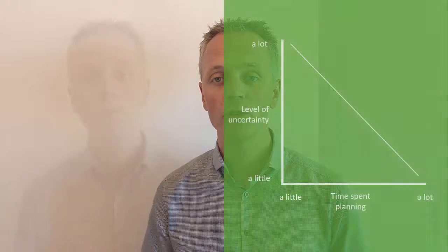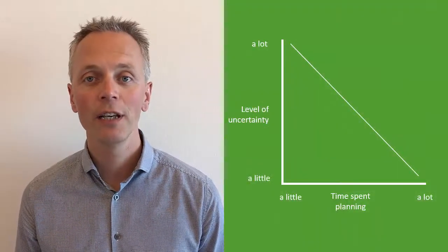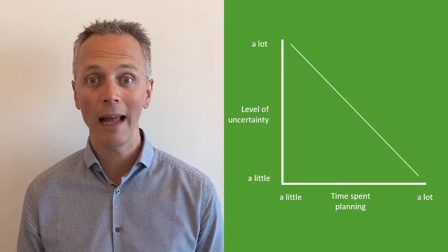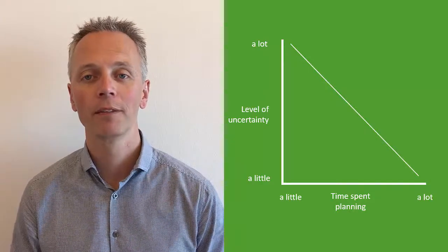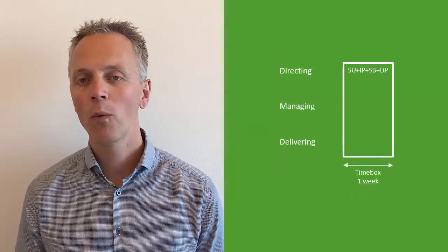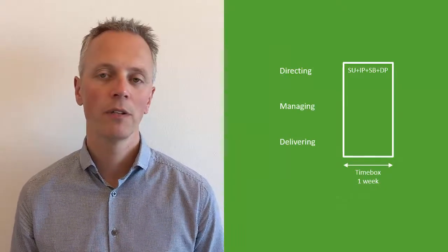The next question is, of course, how do the PRINCE2 processes apply to all of this? Well, we're going to look at the initiation stage and then at the delivery stages. How will that look? First of all, the initiation stage. The initiation stage isn't going to be as long as the rest of the stages. If you're doing 3 or 4 month delivery stages, your initiation stage certainly isn't going to be that long. That wouldn't be sensible in an Agile project. Because remember, the higher the uncertainty, the less time you want to spend planning, especially in a complex environment. So for the initiation stage, you go with a 1 week, maybe a 2-week time box, something like that.